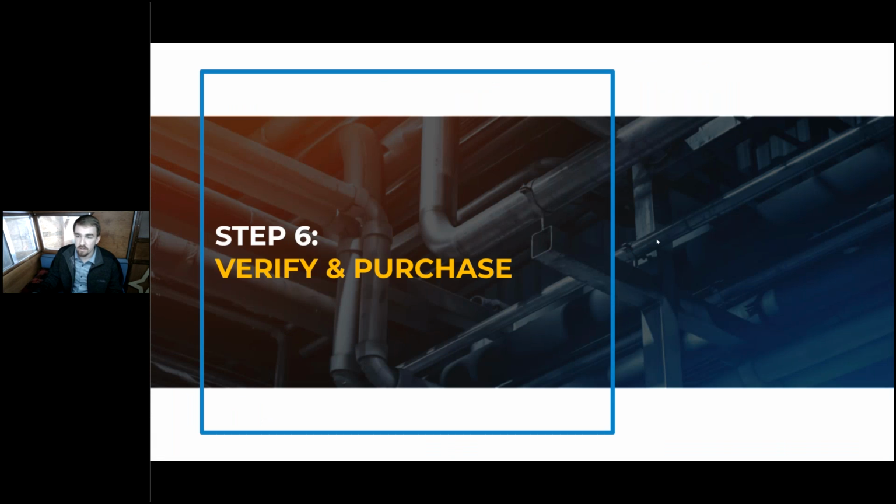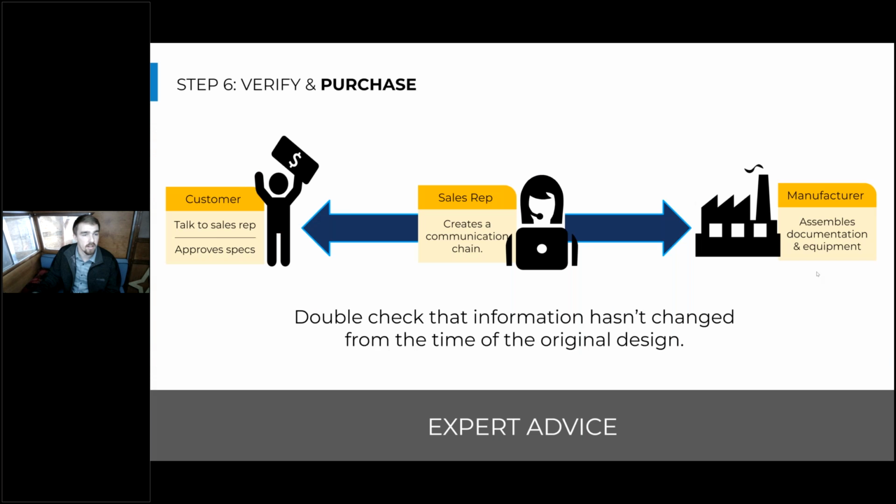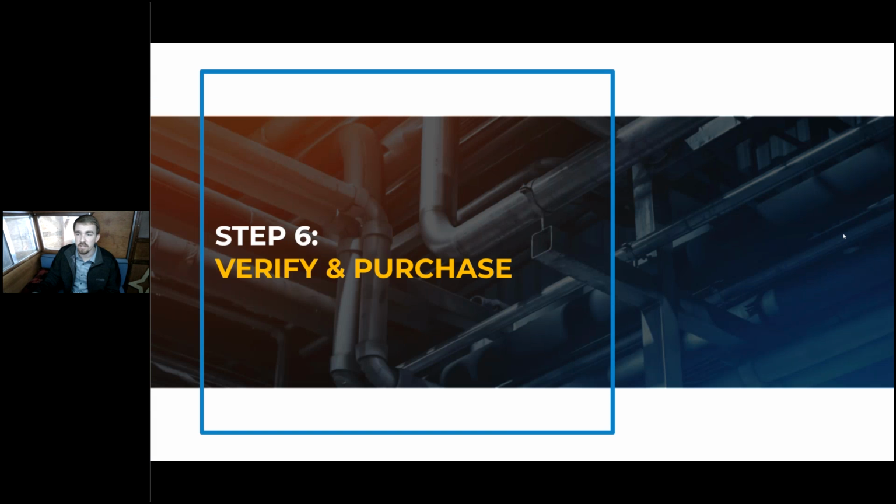And so after the submittal is complete and you've received the sign-off from the engineer, pretty shortly after that down the line, you can verify and purchase your equipment. So a lot of times you'll use the submittals directly to provide that information to your rep. And you want to make sure that you have any additional little details covered in that verification and purchase process.